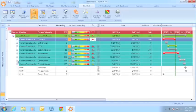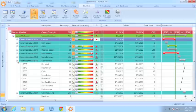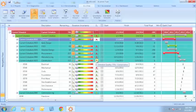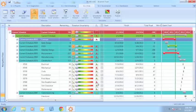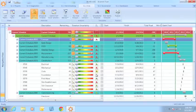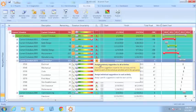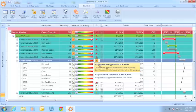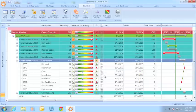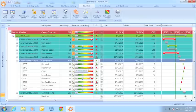But looking at construction, I see that although it's flagged the summary activity as conservative or made a recommendation that this be conservative, there are different recommendations for the individual activities within that construction WBS. Now I can either assign that summary suggestion to all of the children activities or I can use each individual recommendations to do the uncertainty assignment.